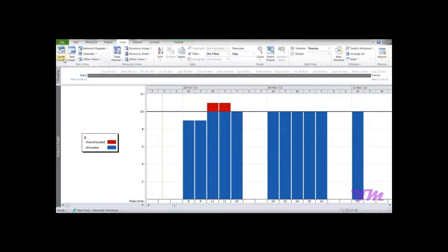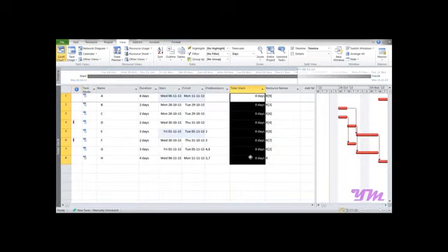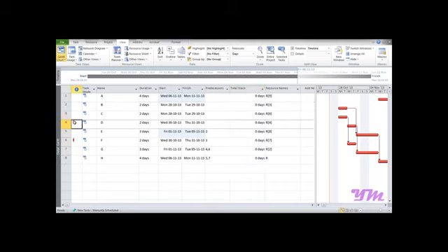affecting the project duration. Now getting back to the detailed Gantt, you can see the available slack is 0, so all the slack is consumed over here in order to balance the resources. Still here you can see these two red markings which say the resources required are more than allocated. So one thing is that you can increase the duration of the task if possible, or reduce the demand for resources to complete that work. So this is all about resource leveling in Microsoft Project 2010.